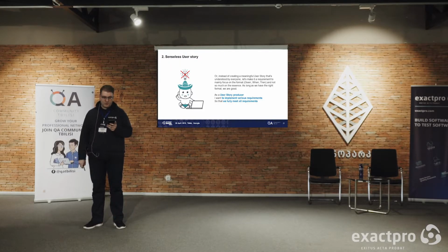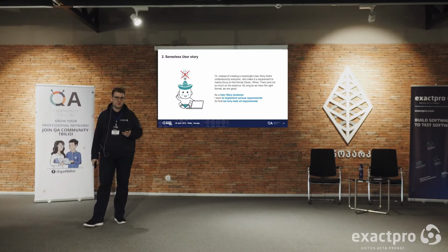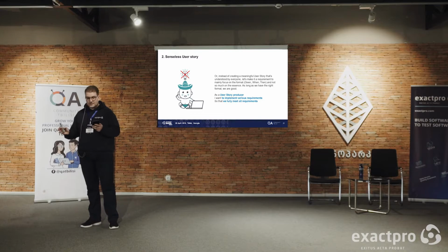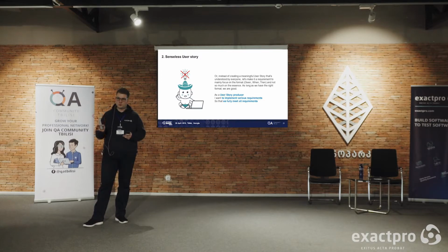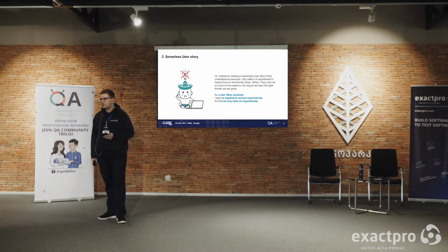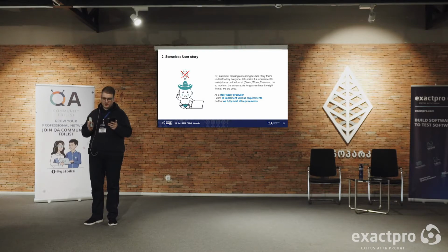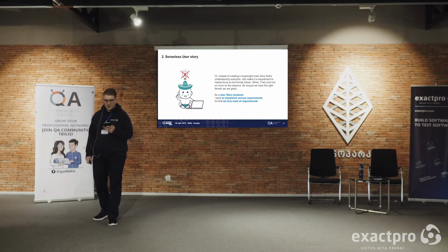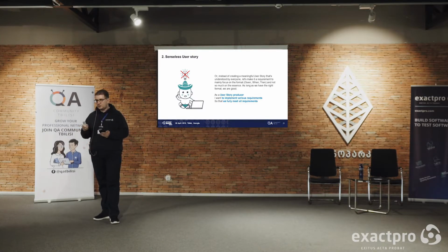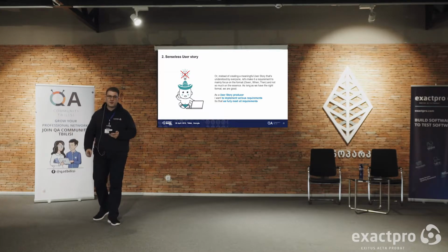How can a good user story be faked? Instead of implementing the sense of a user story, it is possible to implement its form. It sounds like a joke, but in a very real project, implementing a new auction model for a stock exchange, we observed such a type of user story. It said, as a regulated exchange, I would like to do something to satisfy my regulatory obligations. A regulated exchange is not a user, and it does not want anything, but a human can.